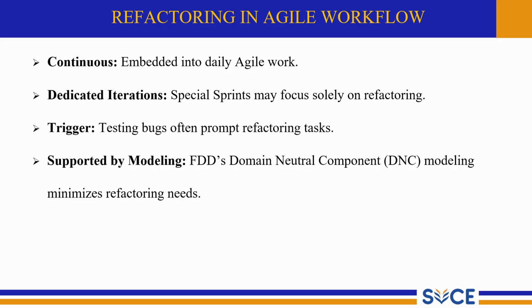Dedicated iterations: special sprints may focus solely on refactoring. Some agile teams schedule refactoring sprints or hardening sprints that focus only on improving code quality. No new features are added during these sprints, only cleanup and optimizations are done to maintain long-term code health.